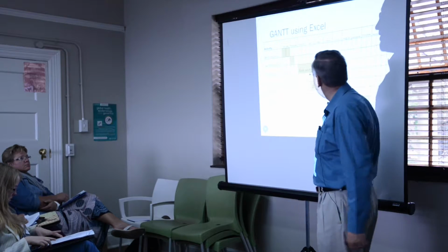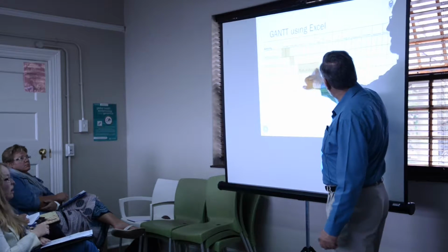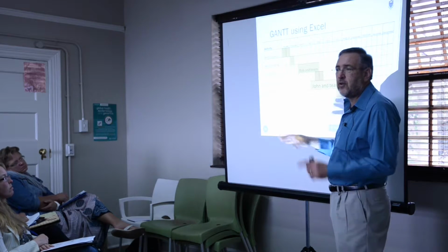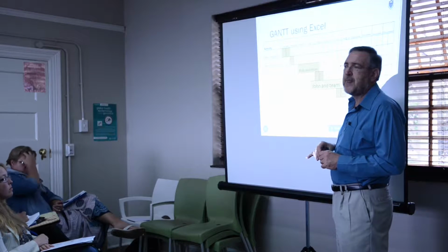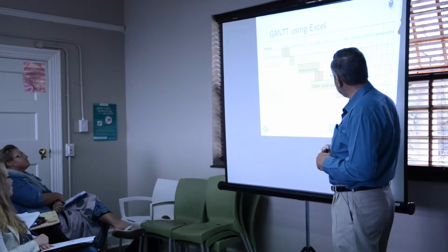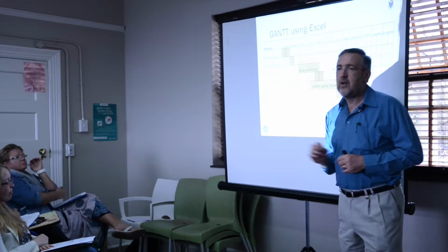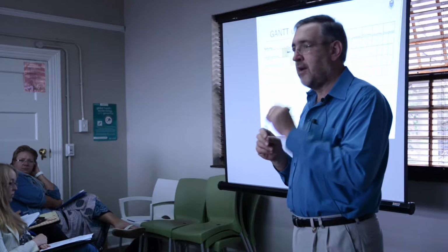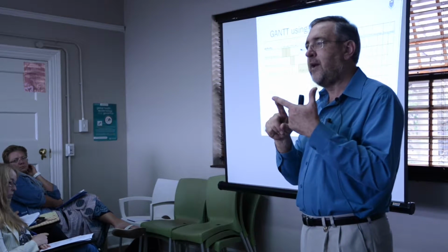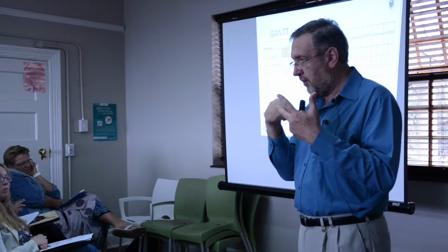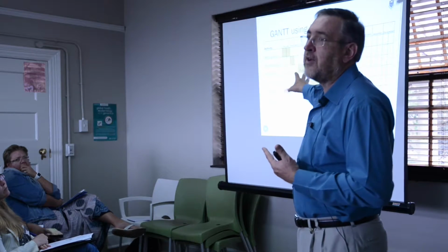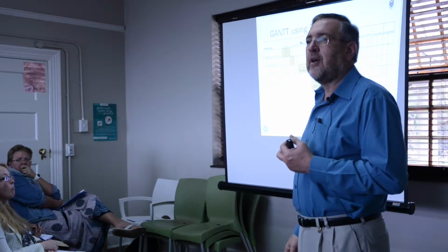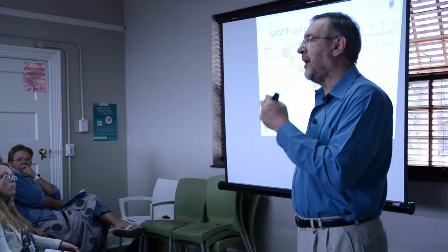Okay, a time buffer. And then also notice these things don't always start after the previous one, some can run in parallel. You can do 2 things at the same time. So don't hesitate to do that. Okay, so that's a picture of your work plan. In your grant application, you're going to describe the work plan, talking about what, when, and who. Remember, all the resources. But I'm also going to have the picture, and I put that in my grant proposal or attach it on at the end, because it shows your level of planning is detailed.